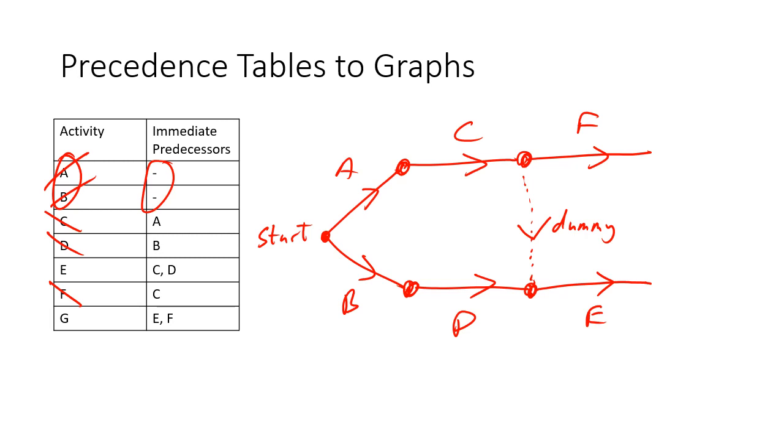All right, now let's just double check that this all makes sense, because we said that if you follow F back, you only go through C. You can't go down D, because we're going backwards through the arrows. So we can't do that. All right, lots of little dots there. But if I look at E, I go backwards against the arrow. I'm also going backwards against this arrow. Remember, the dummy has no weight, so you ignore it and then you go to C and back to D. So that's actually telling us we do actually have C and D. That does actually work. Isn't that nice?